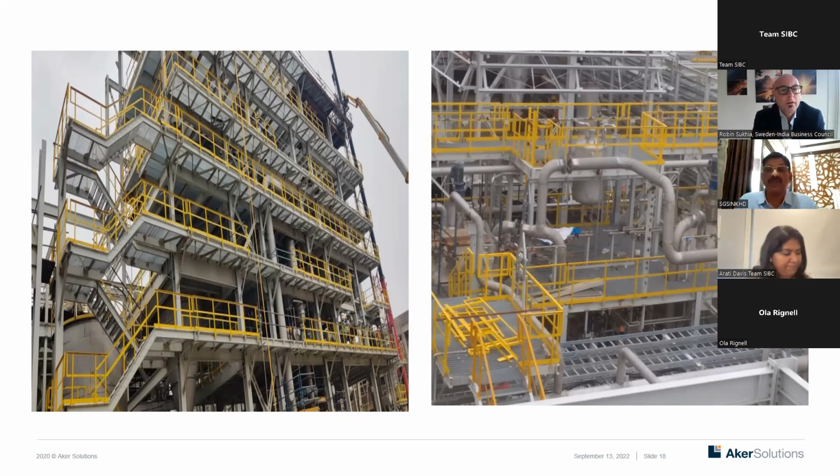Similarly for effluent discharge, we already got the permit, and they advised us to put in a different type of online analyzer, where they can see from their office the discharge quality and other things. Similarly, for all the chimney and exhaust systems, in the EC environmental permit, the government mentions the maximum discharge at different levels. So we have the online monitoring system, which is to be connected to the government authority. Gujarat falls under the Gujarat Pollution Control Board, so they can get the online facility on this.